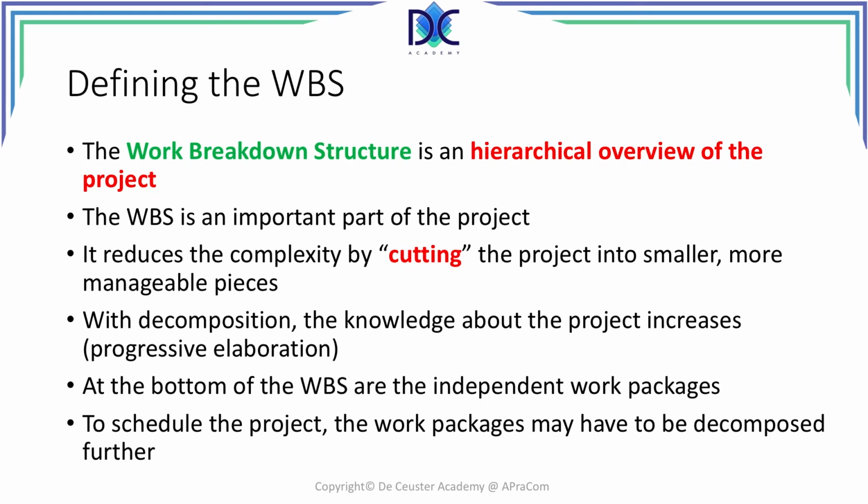And like I said before, decomposing creates more knowledge about the project. The decomposition is a kind of progressive elaboration. The bottom of the WBS, according to PMI, is composed of the independent work packages. But like I said before, in order to be able to schedule the project, we may have to decompose those work packages further. A work package is not sufficiently detailed to plan a project completely.